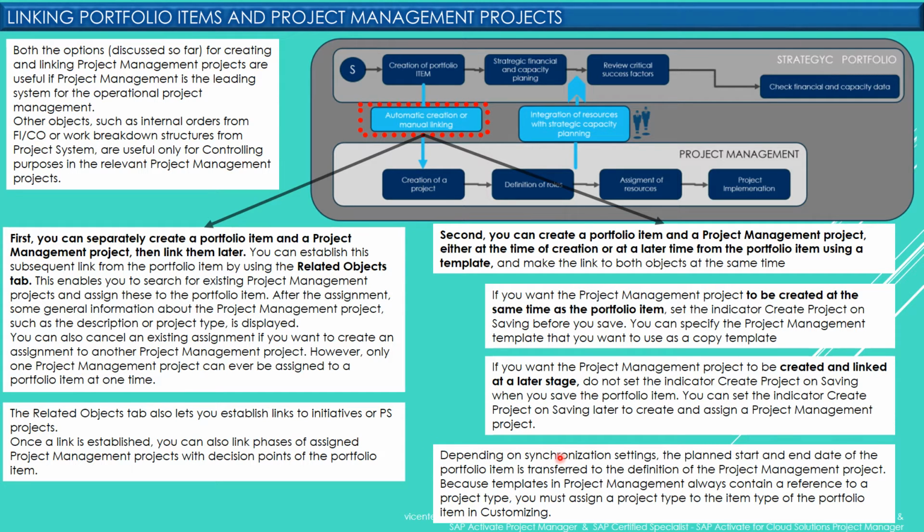Depending on synchronization settings, the planned start and end date of the portfolio item is transferred to the definition of the project management project. Because templates in project management always contain a reference to a project type, you must assign a project type to the item type of the portfolio item in customizing.